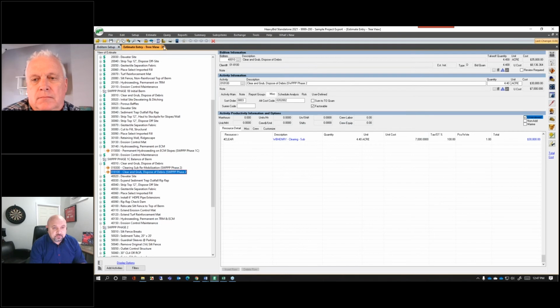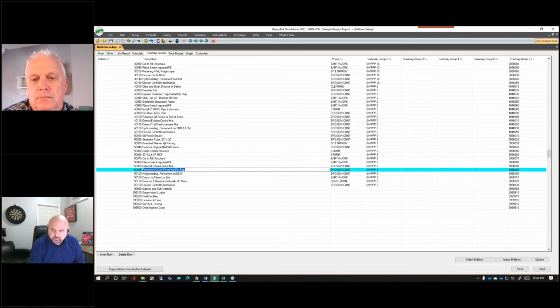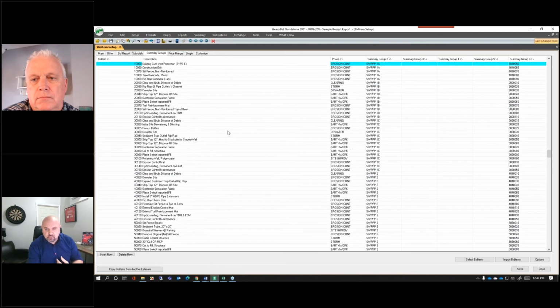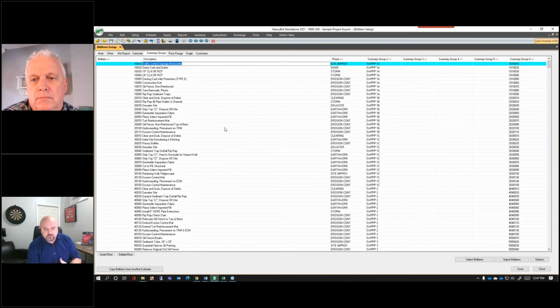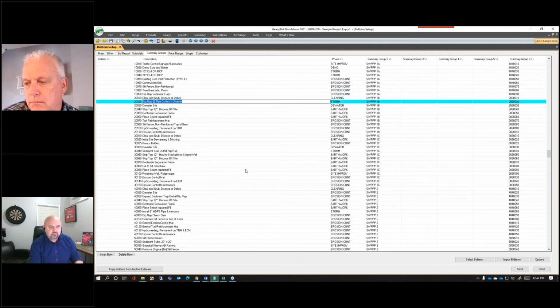The other thing that we wanted to touch on is, how do we handle change orders, and what's the best practice? So the typical way I see most change orders happening within HeavyBid, and really a proven good way to do it, is that once an estimate is conformed, we don't ever really want to change that again. We like to keep our original estimate intact.